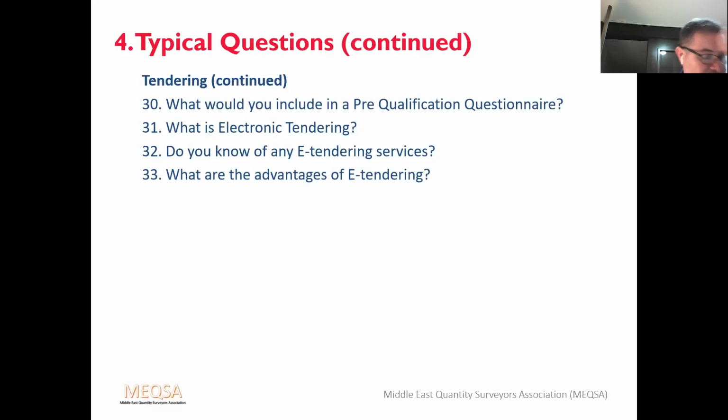What is online bidding? Well, tenderers can view and download the tender information online. The bidding process commences at a specific time. The client sets an opening price and tenderers compete by under-bidding. Tenderers can submit as many bids as they like until the closing time. It's common that if a new bid is submitted within 30 minutes of closing time, it is extended to allow other tenderers to respond. If the tender is awarded on price alone, the lowest tenderer gets immediate feedback. It's almost like an online auction, really.